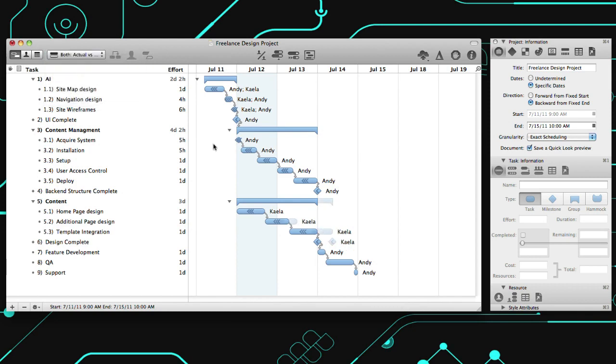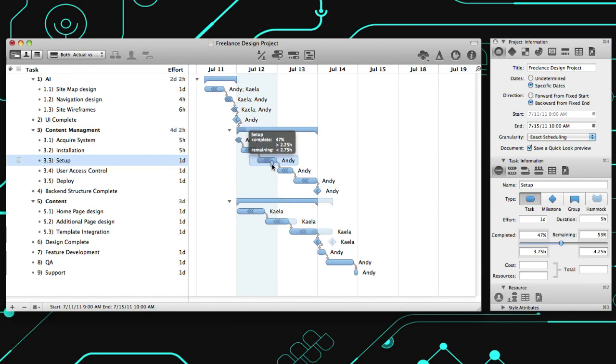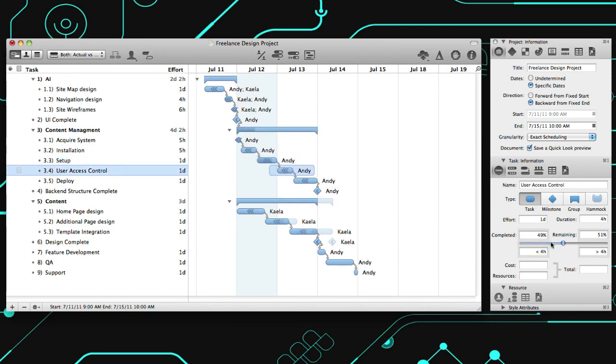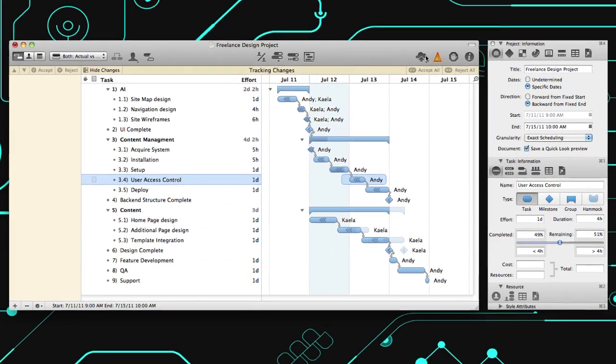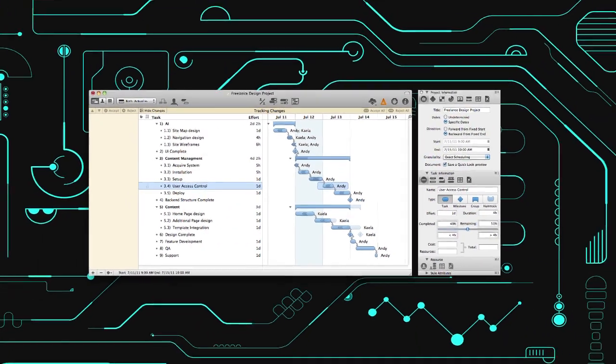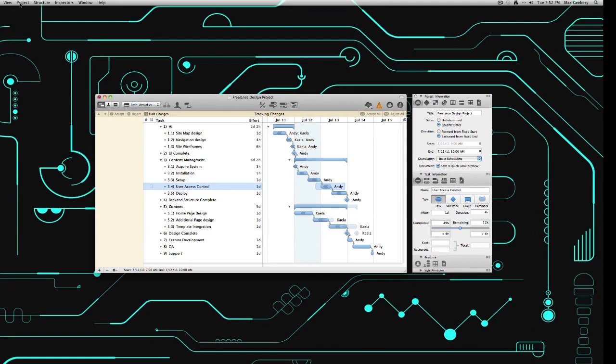Update the task completion percentage by dragging the handle on the bar in the Gantt chart, or within the Task Information Inspector. Now that you and your team have updated the project, use Change Tracking to view and manage changes.